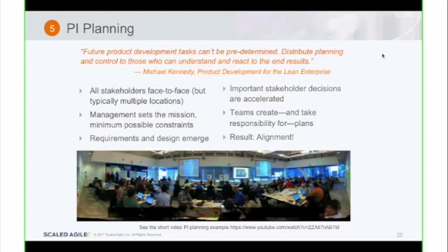So right away, with a feature where you have a dependency on another team, either you have to take that on and build it yourself, or you have to come up with a workaround, or you have to maybe negotiate with the team that got their dependencies in first, and that issue has to get escalated to their management, and maybe it creates more capacity for that API team so that they can meet your dependency, right? So these are very complicated issues.